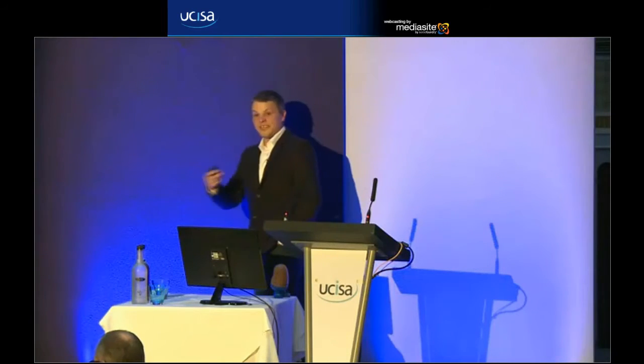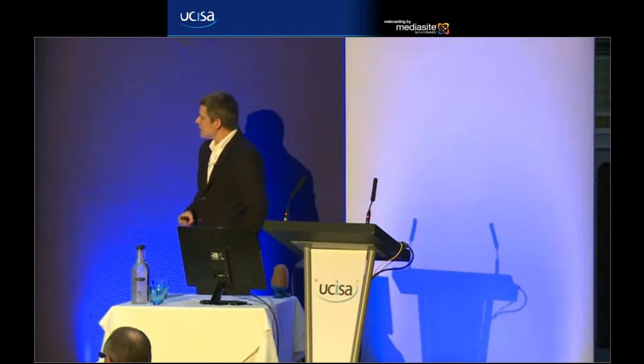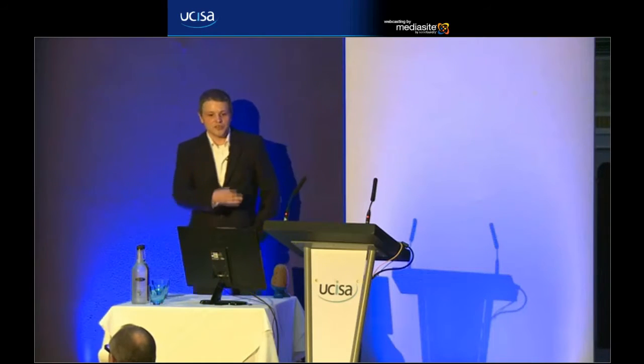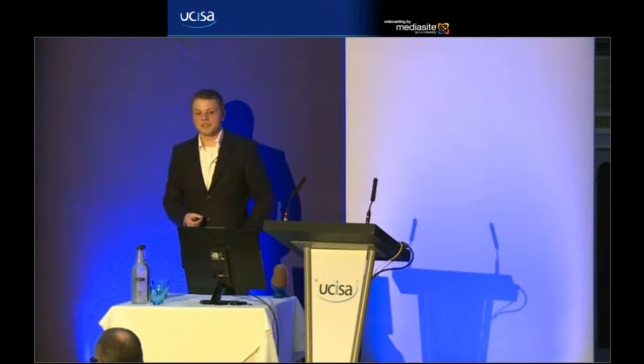And we know that the iteration length is 3 weeks, because we fixed that. That's what we said we're going to do. So, simple equation: total story points divided by team velocity, multiplied by the iteration length, gives us an estimated time for the whole project of 18 weeks.